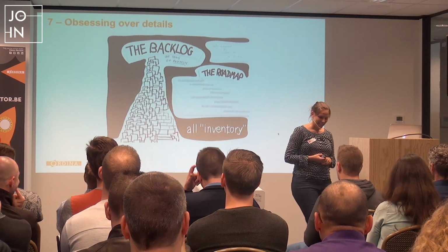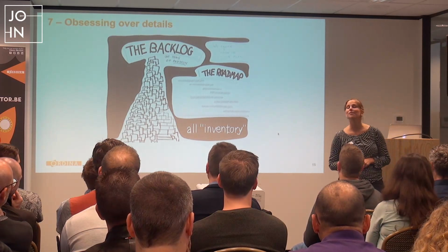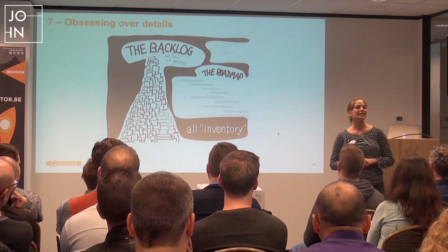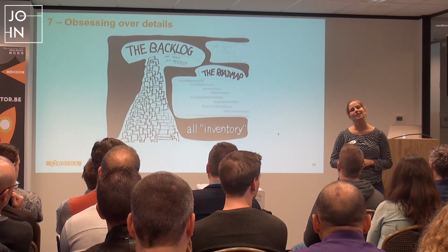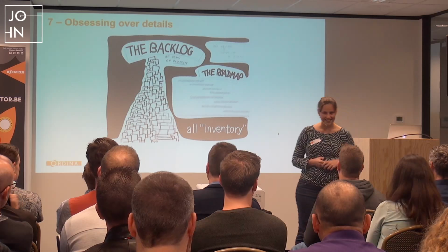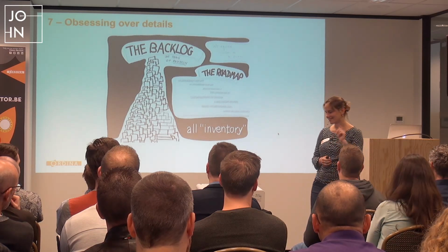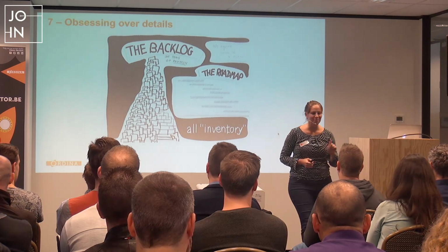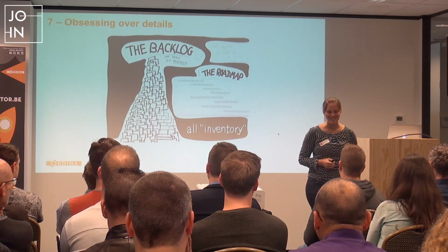I have created a backlog of 150 items, and that's actually not that bad. I've seen product backlogs of 300 to 800 product backlog items. But what my mentor at the time told me was a very valuable and very hard lesson to learn: you're going to take the first 50 and you're going to delete the other 100. Yeah. And I did that in Jira, and you still had to delete them one by one, so it was a very hard lesson to learn.